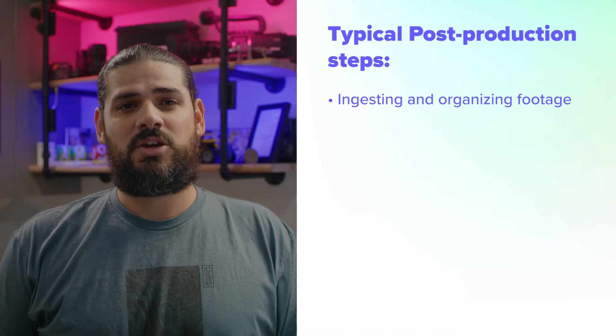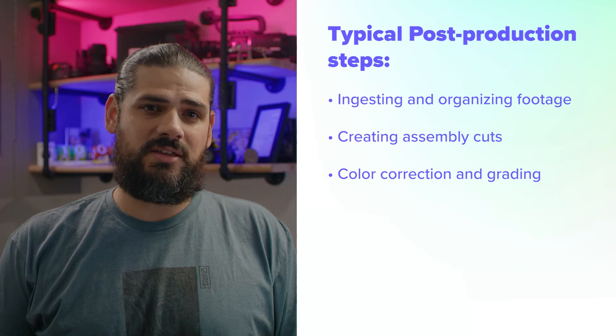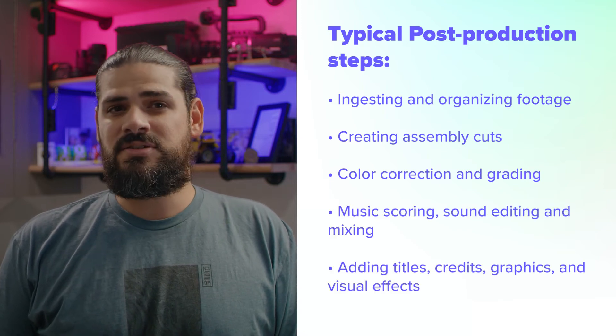Just because you call a wrap on filming doesn't mean the hard work is done. On most video projects, post-production takes as long — if not longer — than pre-production and production combined. Key steps include ingesting and organizing footage, creating assembly cuts, color correction and grading, music scoring and sound editing and mixing, and adding titles, credits, graphics, and visual effects. Be sure to get approval from your stakeholders before exporting the final cut, and look for opportunities to streamline feedback in a centralized place to avoid an endless loop of revisions. Once you get the green light to launch, you're ready to post and promote your video across your digital marketing channels.